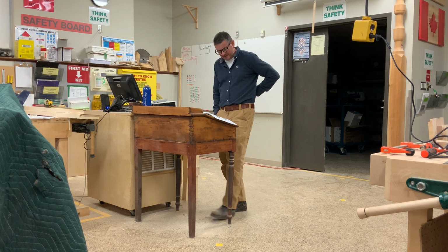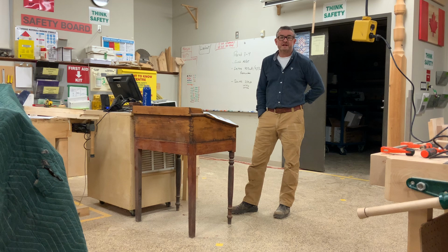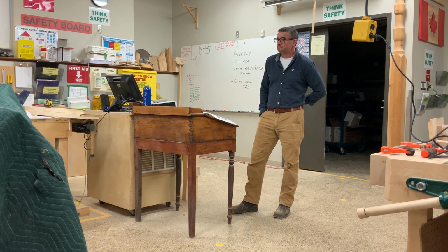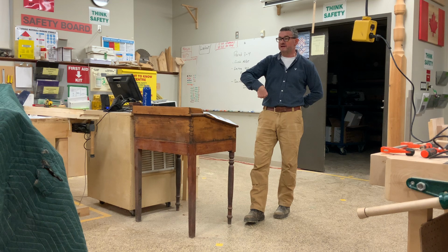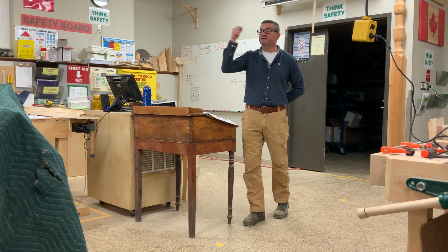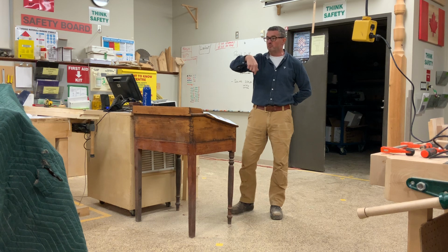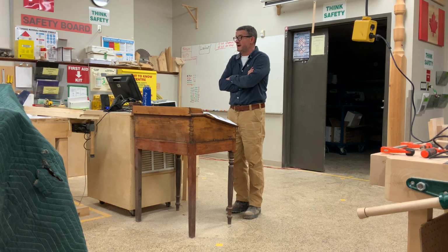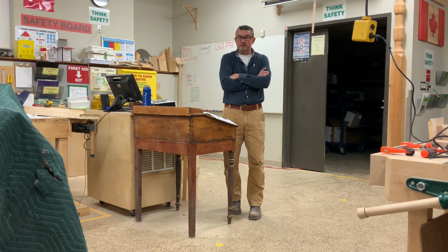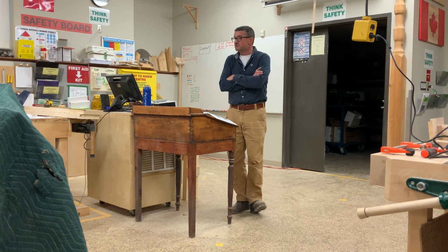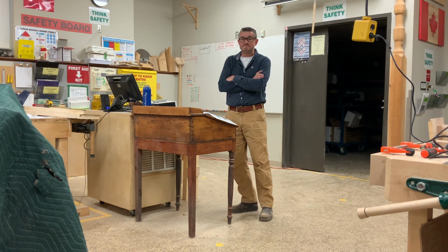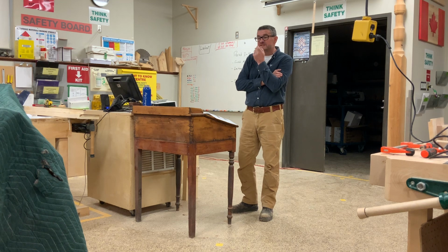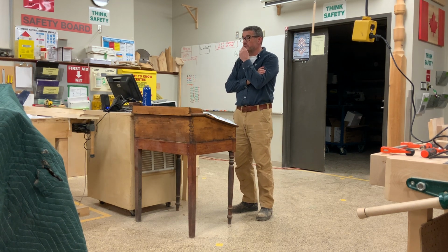The bottom picture on page 4, the bottom right, that's a smoke detector. And it's wrapped in newspaper. Why is that? So I'm gonna make huge amounts of dust, then I'm gonna bring in a paint contractor. He or she's either gonna roll or spray, so I don't wanna destroy the smoke detector. I wanna keep it active the whole time, but I wanna protect it from dust, paint, etc. So I wrap it in newspaper. Why is that? Because dust sets it off. Because dust sets them off sometimes. Dust will definitely set them off or completely ruin them.